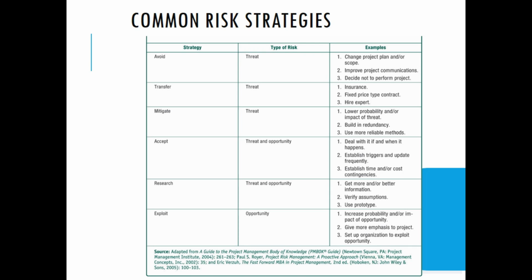Now, next strategy is exploit the risk. Exploit is to use it for good. It is usually used for a positive risk or an opportunity. For example, we increase the probability and or impact of the opportunity, give more emphasis on the project.